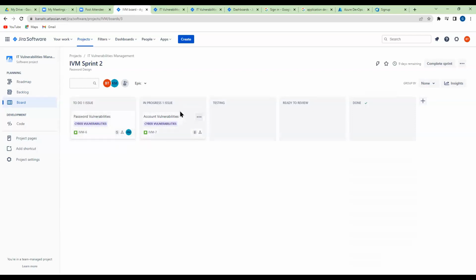So now, this story, all of them were here in the backlog, but you already agree as a team what this story has to meet to be able to go to done. The goal is that this story during this sprint must go like this, must go like this, until it goes to done. When it goes to done, that means you completed that story. But for that to happen, the definition of done has to come into play. That means it has to meet certain definition, come to the testing, go for review, go to done. So that's how your focus is only on those things.